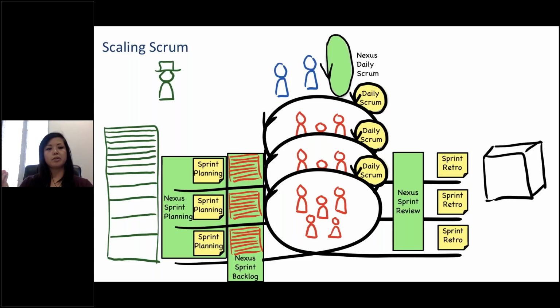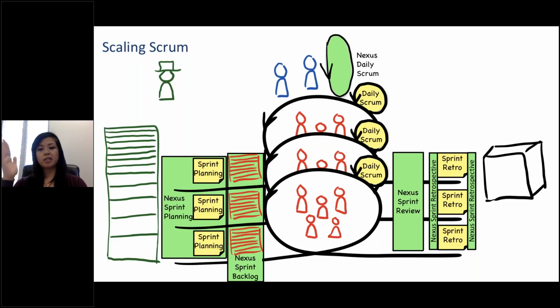For this one, we could say they had a really busy product owner because we're starting to scale. They have to talk to different clients, different partners, and the organization. What really benefits that is being able to have that Nexus level retrospective conversation about what is affecting our Nexus before and after. Because if you come in before, you can say, these are the high-level issues that are affecting not just one team, but systematically all of us. Then we can come into our individual conversations, and then figure out in the last part of the sandwich what actions we can take into the next sprint.